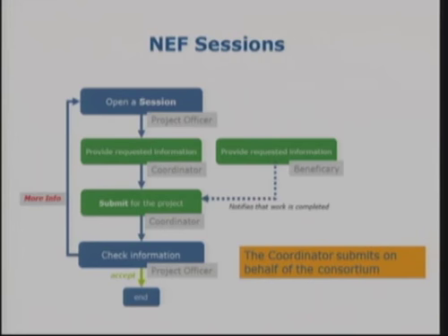You have to provide clarifications or require additional information to the project officer related to the periodic report and its financial aspects. You have to be an intermediary between the project officer and the beneficiaries. Those are your roles as coordinators in this process. Your beneficiaries are required to complete the financial statements, what we call the Form Cs. They have to upload the certificate of financial statements if it's required, and they will have to sign off the financial statement and dispatch it to you.